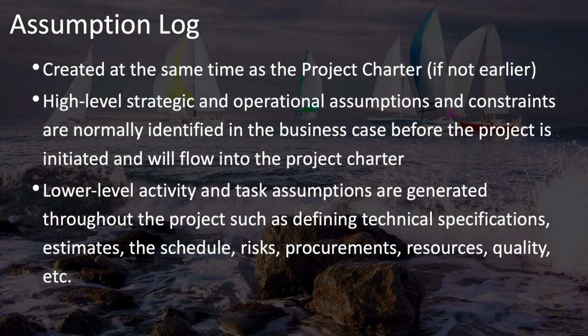It's also possible that the assumption log may have been created even before the project charter is started. In fact, it will include high-level strategic and operational assumptions and constraints that were identified during the business case before the project was even initiated. And so those assumptions and constraints need to be identified and pulled into the project charter so that they're not forgotten and buried in the business case or needs assessment.